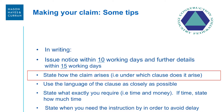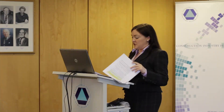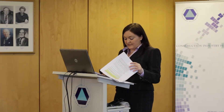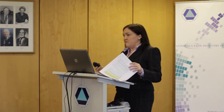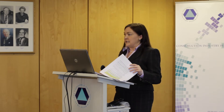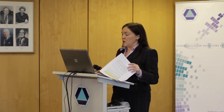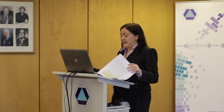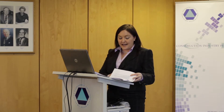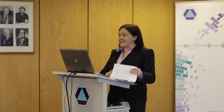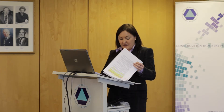State how the claim arises and under which clauses it arises. For example, if you're looking at clause 2.7 - where another contractor hasn't arrived to do what they were supposed to do - state that and say you're requesting an extension of time because of the failure of X Limited to lay the rebar or whatever else they're supposed to do. State: 'I'm making my claim in accordance with clause 4.7 under clause 2.7.' Use the language of the clause as closely as possible. It only needs three or four lines maximum, and if you keep to the letter of the contract there's much less scope to argue against you at a later stage.